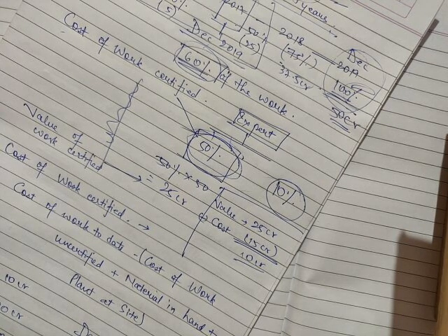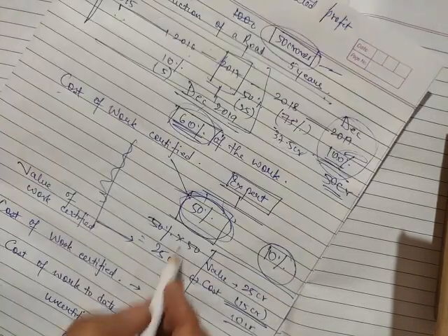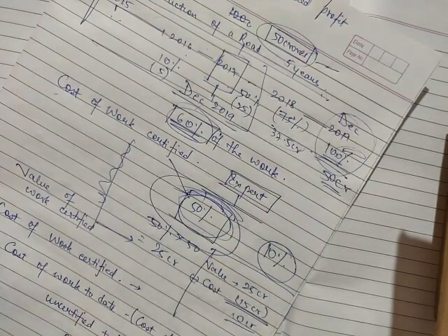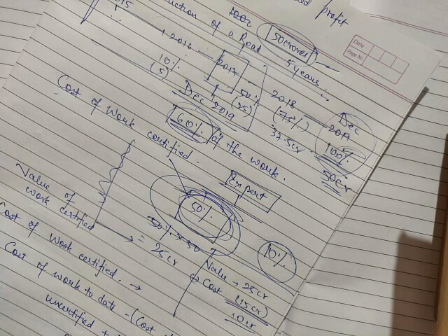So we have seen what is the value of work certified. Work certified is how much the expert is saying that it is complete. Work uncertified is the portion of the job where the contractor has finished the work but the expert does not certify it. Progress payment is the part of the contract price that you have received till date.